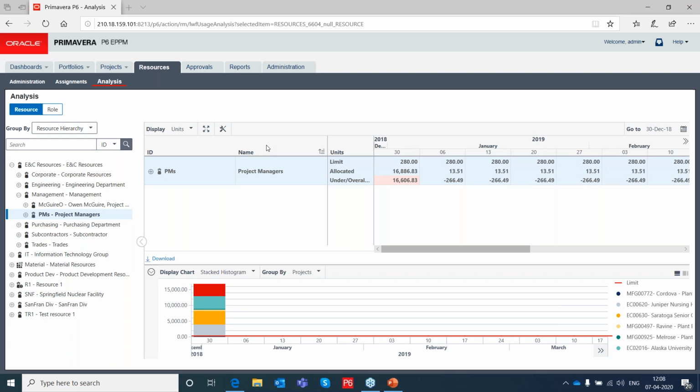When I give a duration estimate to my activity, that is based on the productivity factor. After that, if the productivity is reduced or increased, I can change the resource utilization. That's all I can do, but I can't change it on the duration directly.